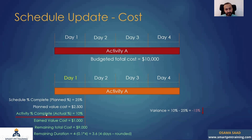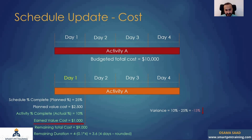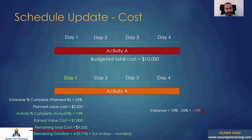The activity percentage complete comes from site. As per the progress data, it's only 10%, so clearly we are in delay. We are supposed to have 25%, but we did only 10%. The earned value cost in this case is $1,000 — that's 10% completed times the total cost. The remaining total cost is $10,000 minus the earned value cost, giving us $9,000 left to claim.